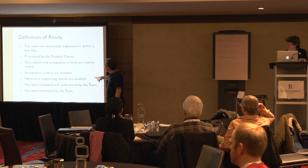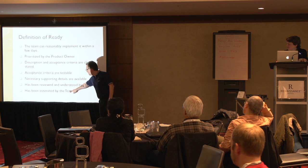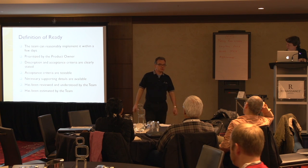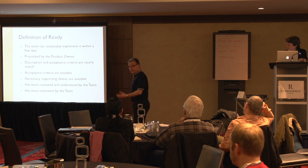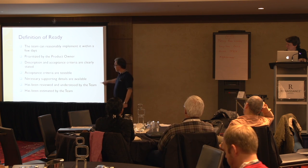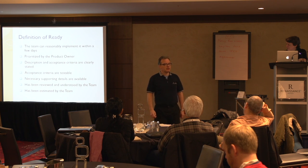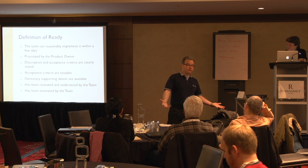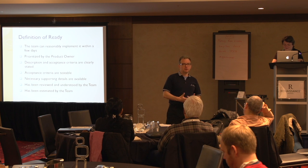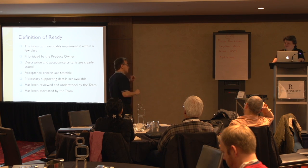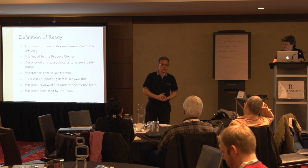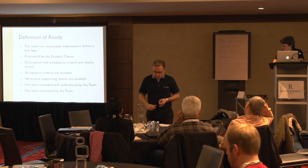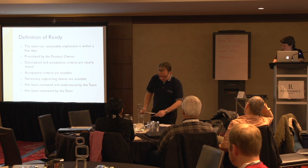We wanted to make sure everything is reviewed, understood, and estimated or re-estimated by the team. If you don't do the grooming discussion properly, you have to have those conversations during sprint planning. And if you find out something isn't right during sprint planning, you block the team. Your movements are not synchronized — not only that, they're not in harmony. Although the steps may be there, they're not flowing.